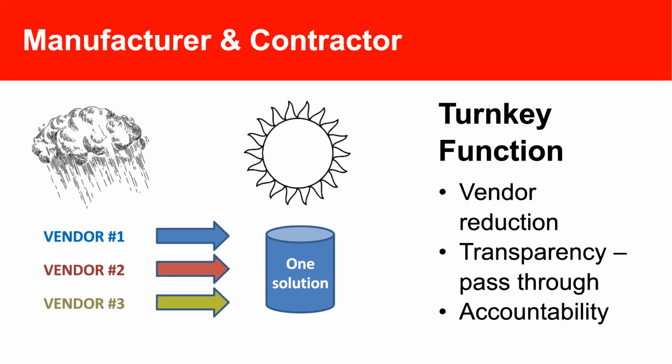The second is direct cost savings. This is the more obvious one that the asset managers, purchasing, and accounting folks look at. But the black and white number is that if there's one contractor managing multiple functions, this minimizes mobilization costs exponentially. Additionally, you're able to take advantage of pass-through catalyst costing from the contractor themselves. You hire the contractor with the capability and program to support this. You can take advantage of buying that catalyst, getting the install complete with full transparency of costing through and through, and no markup.